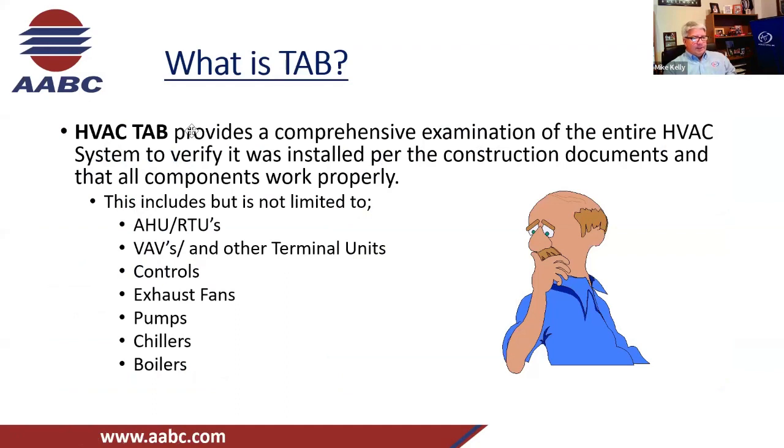What is testing, adjusting, and balancing, or TAB? HVAC TAB provides a comprehensive examination of the entire HVAC system to verify it was installed per the contract documents and that all components work properly. This includes, but is not limited to, all the equipment listed below.